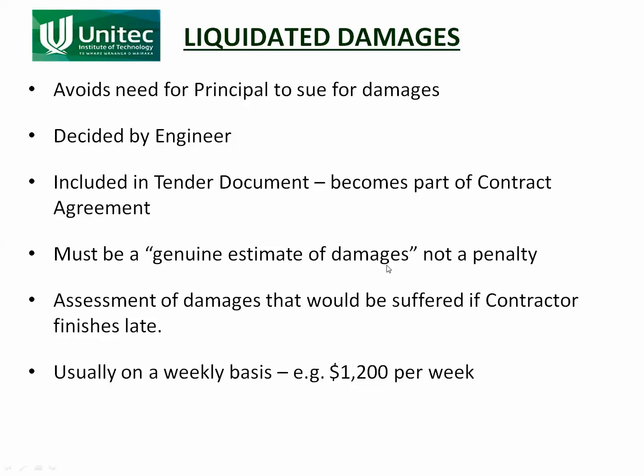Liquidated damages have to be a genuine estimate of damages. If you're building a road and you want to make sure the contractor finishes on time, you can't say liquidated damages are a million dollars a day — that would not be a genuine estimate of actual damages. If the contractor can prove that the amount of damages is much higher than what could reasonably be expected as actual cost to the client, then he can get those damages dropped. It's usually on a weekly basis — about a thousand dollars per week for a normal-sized project.